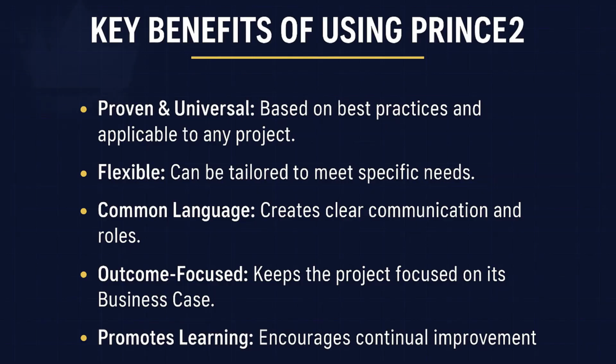They monitor progress, handle issues, but the key PRINCE2 control point is at the end of stage 2. The stage boundary. Yes. Before closing, the PM uses the Managing a Stage Boundary, SB process. They have to assess the overall success of the 4 time boxes against the plan, recheck the business case, did we deliver the MVP value, and then formally submit the results and a closure recommendation to the board, using DP for approval. PRINCE2 controls the boundaries and the overall justification.